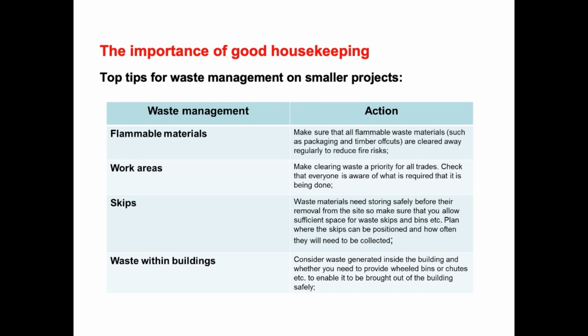Skips. Waste materials need storing safely before their removal from the site, so make sure that you allow sufficient space for waste skips and bins, etc. Plan where skips can be positioned and how often they will need to be collected. Waste within buildings. Consider waste generated inside the building and whether you need to provide wheeled bins or chutes, etc. to enable it to be brought out of the building safely.